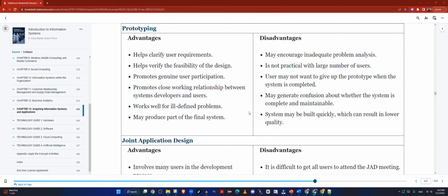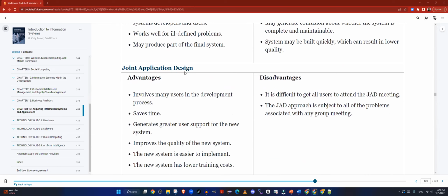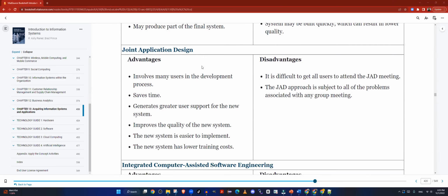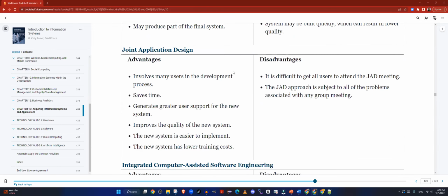Those kind of false things. So another approach that some businesses take is called JAD, Joint Application Development. And again, you'll be learning about some of these in a lot more detail in Systems Analysis and Design class, which is like a project management class in 4th semester. So the JAD approach is where you ask somebody from the client's team to sit on your project team, and they're part of your team while you are doing the whole process.